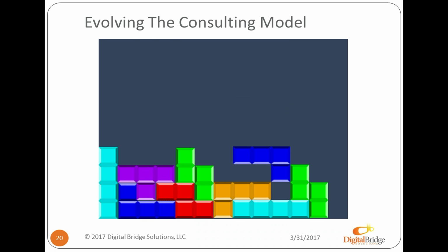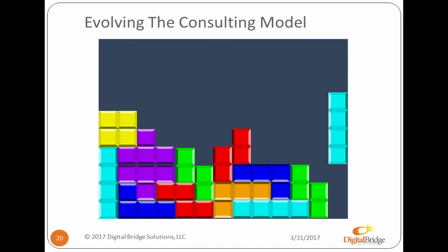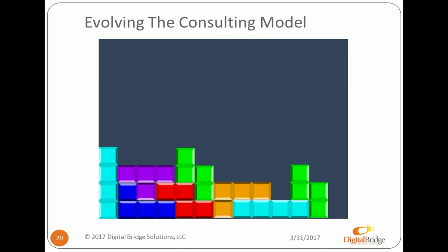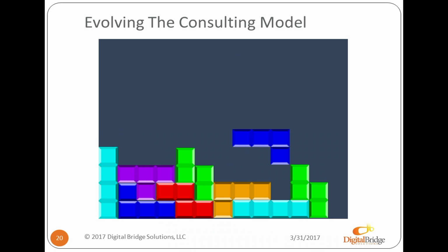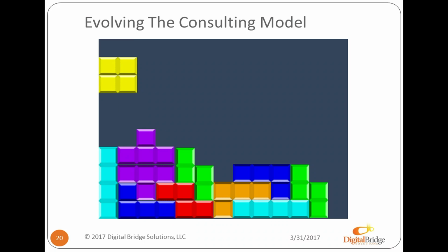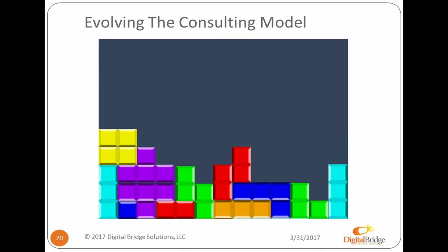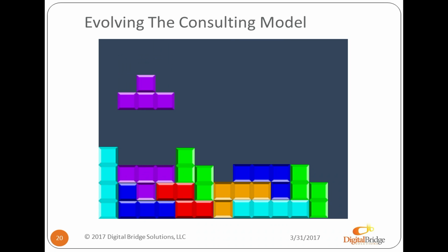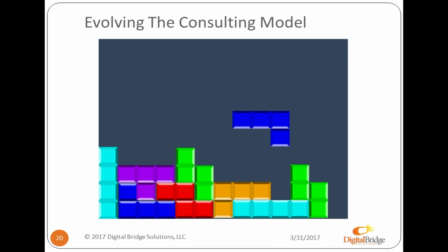It's basically Tetris, right? That's kind of what our organization does. You have this 40-hour week and you're trying to slot times into that person, and that means they're doing multiple things for that 40-hour week, and you're trying to minimize the number of gaps that organization has. So that's how we approach this problem, by taking each team member and then subdividing their time so they're working on multiple things. The client still gets what they want without having to pay for the availability of a full project team.